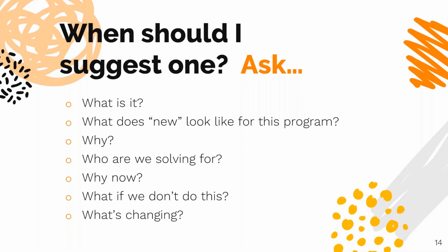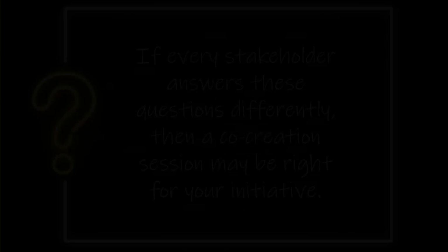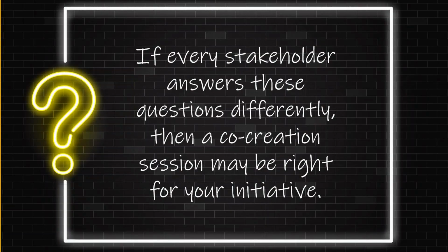So when should I suggest a co-creation session? You want to be asking these kinds of questions of your stakeholder and your SME. What is it? What does new need to look like for the program? Why are we doing it and who are we solving for? Why are we doing this now? And what if we don't do this, right? What's changing that's causing the need for this? And if every stakeholder answers these questions differently, then a co-creation session might be right for your initiative.